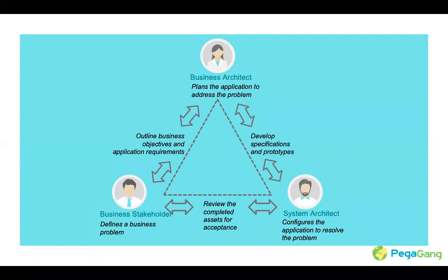So as you read by the highlighters, you are actually going to plan the application, and you know how this application has to address the business problem or the business processes. To do that, you are going to spend a good amount of time on your sprint zero. Guys, I'm just trying to use a little bit of agile language. If anyone is uncomfortable, just highlight that out, because I just wanted you to also get acquainted with that. So sprint zero or maybe sprint one is actually dedicated to discussing the business problem statement, how we are going to address it, and what is the strategy to move forward. That is how you are going to engage your business stakeholders.